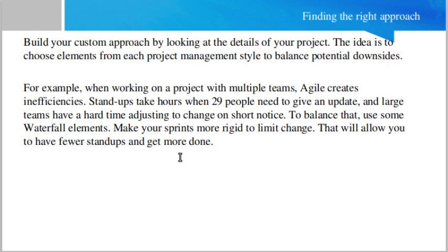Because if there is a very large team, for example 40 team members, you obviously cannot use the concept of stand-up, because if 40 persons are giving their updates, they cannot finish in 5 to 10 or 15 minutes. They will require enough time as well. So you have to use your sense of where it is good to use the waterfall approach and where it is good to use the agile approach.